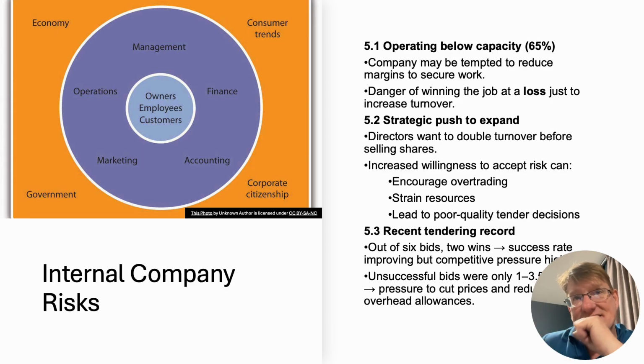So I went in, did some analysis based on who was winning the contracts, and it was because their preliminaries were just too high. With a small refurb I can understand, but they were really high, something like 30%. They had just got used to winning these contracts with the universities, with the student accommodation, doing all the refurbs. The small refurbs, anything up to about 250,000, we're talking now, back in, like I said to you, 2010.